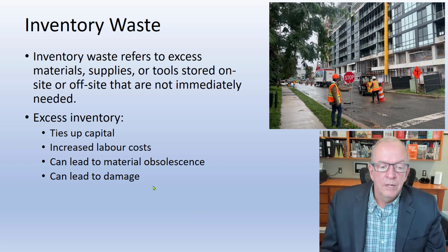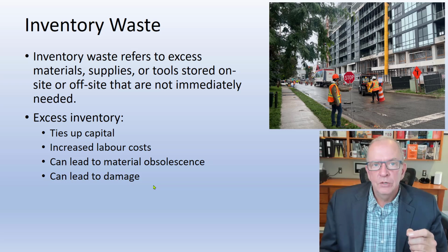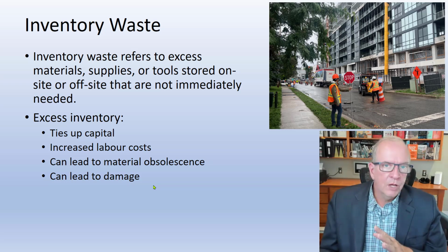Excess inventory can lead to material obsolescence. Well, if we order something too early, that can tie to perhaps where something has a certain shelf life to it, that basically now we can't use it anymore.